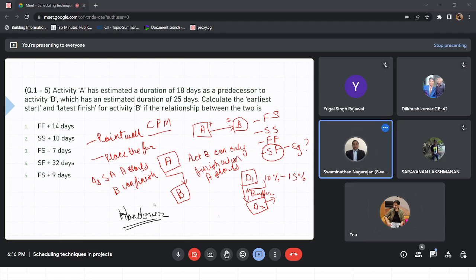I would repeat it once again. Let's suppose that activity B is transporting machinery from place Q to place R. Now at R, work can only start when the machinery is there, but you need some people there so that they can unload the machinery or place it in the right position, so that your activity B, the delivery of machinery, gets over and work with that machinery starts.